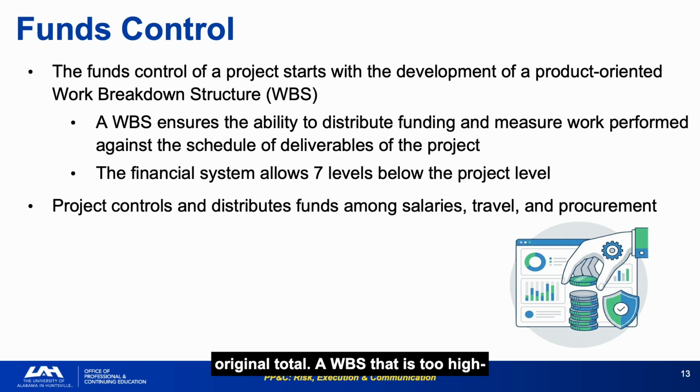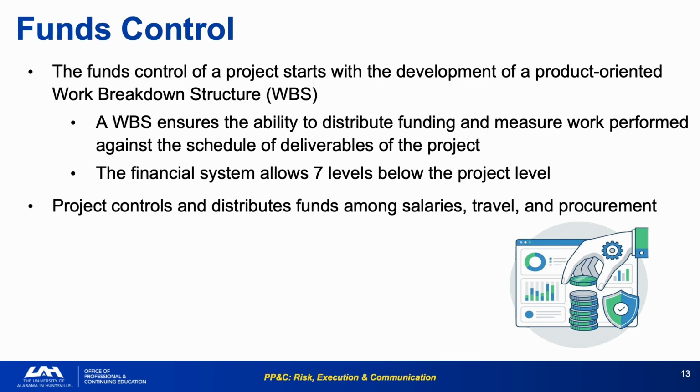A WBS that is too high level for funds control creates situations where multiple activities compete for the same account, which makes variance analysis impossible and creates compliance risk. Ensure your project's WBS is sufficiently detailed to enable meaningful control of funds at the control account level. If two unrelated activities share a funding code, you have a funds control problem waiting to happen.